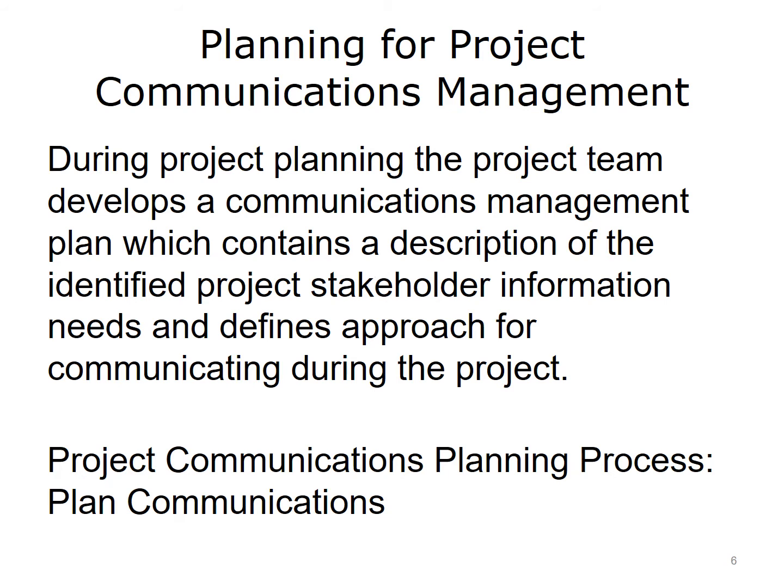Information in the Communication Management Plan may include organization charts, responsibility assignment matrix, RAM, name and contact info of change control board members, meeting times and locations, locations of team members, plus more as determined by the project management team.